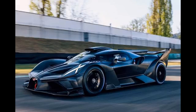Completing: After 2 bi-weekly cycles, LJRC selects a vendor based on their design exceeding the 15% weight reduction target by achieving a 17% reduction, 1,815 pounds, and showing a potential 1.2-second lap time improvement in simulations. Vendor completes the car body according to the finalized design. LJRC conducts comprehensive weight analysis, verifying the 1,815-pound weight, and wind tunnel testing to confirm the 1.2-second lap time improvement.